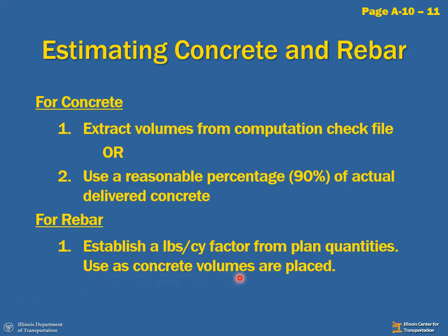We use the concrete volumes as the one that's placed and then multiply that 90% times our delivered amount. Then we multiply by this factor. That'll give us the pounds of rebar. Let's show you an example.